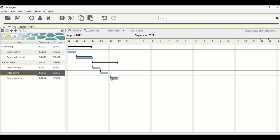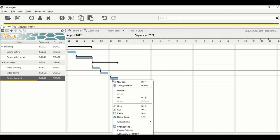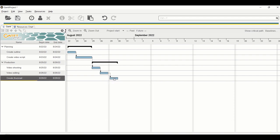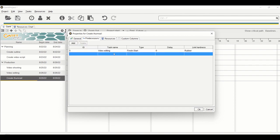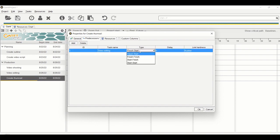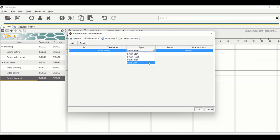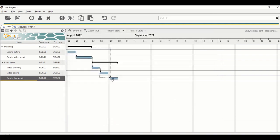Let's change the task relationship by right-clicking on the task bar for create thumbnail. There's a spelling error, so I'm going to change it. The predecessor will be video editing, but the type is finish-to-start. We want to change it to start-to-start. Just click on the finish-to-start and you can see a dropdown dialog box. Select the last option, which is start-to-start. Click OK. Now you can move the task around.